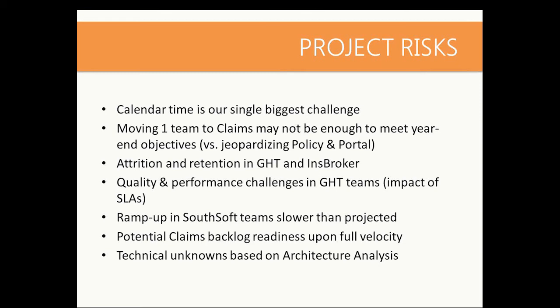As a lead consultant with Cisco voice technology, it was around 1,500 people in total. But I was not responsible for content there. I was responsible to help redesign the whole software development lifecycle, the whole program structure. They came out of a heavy waterfall project structure with 15-month projects running and overrunning grossly.